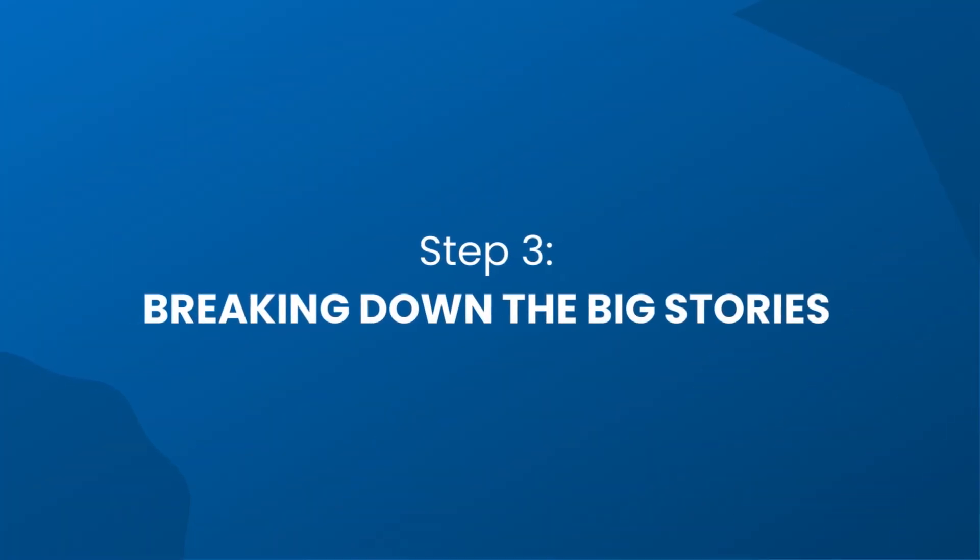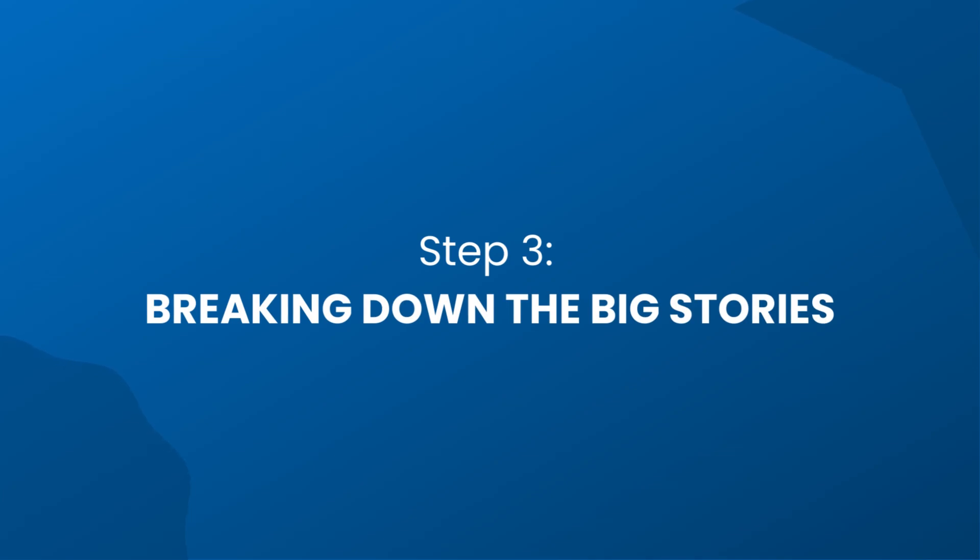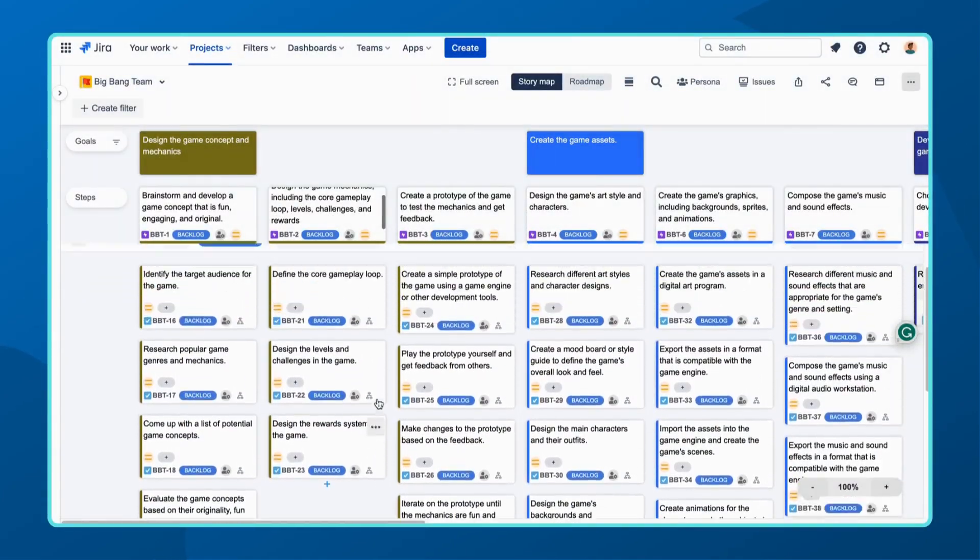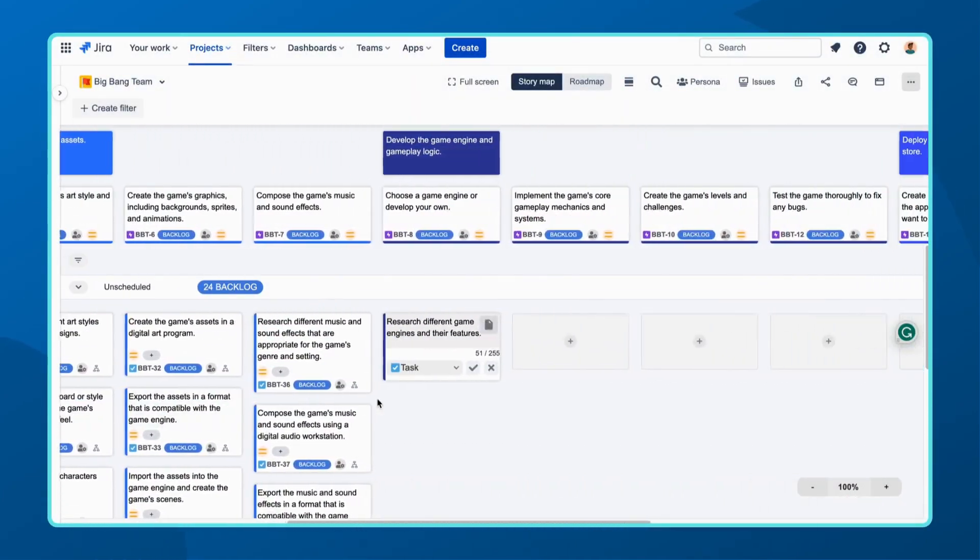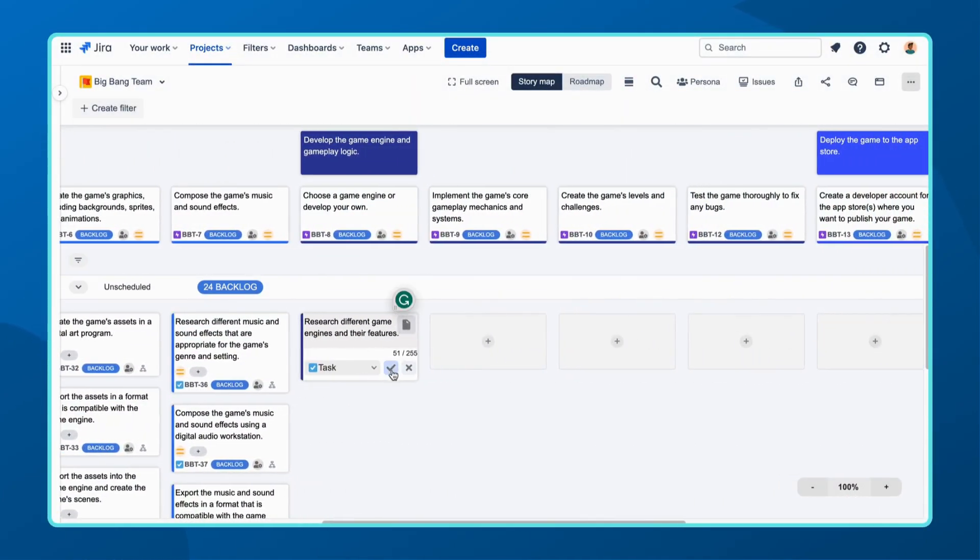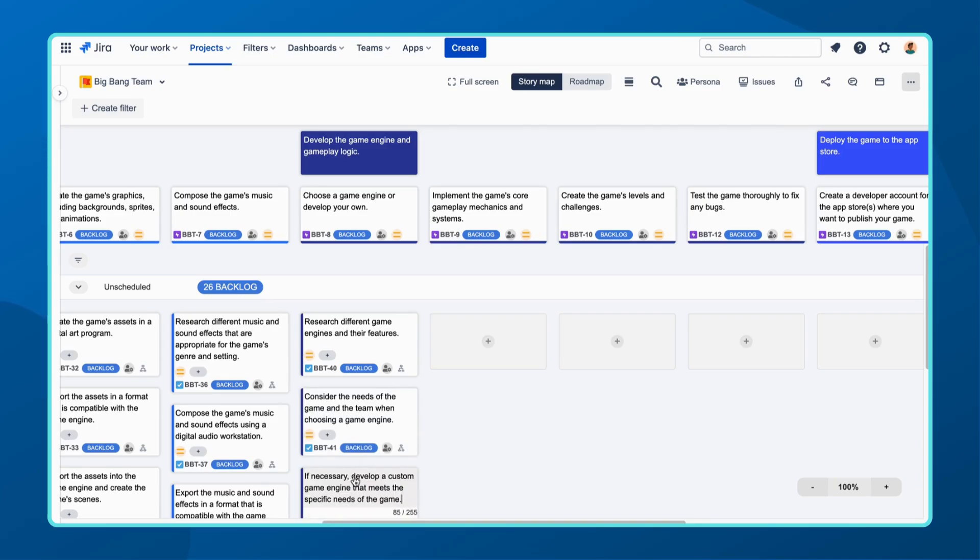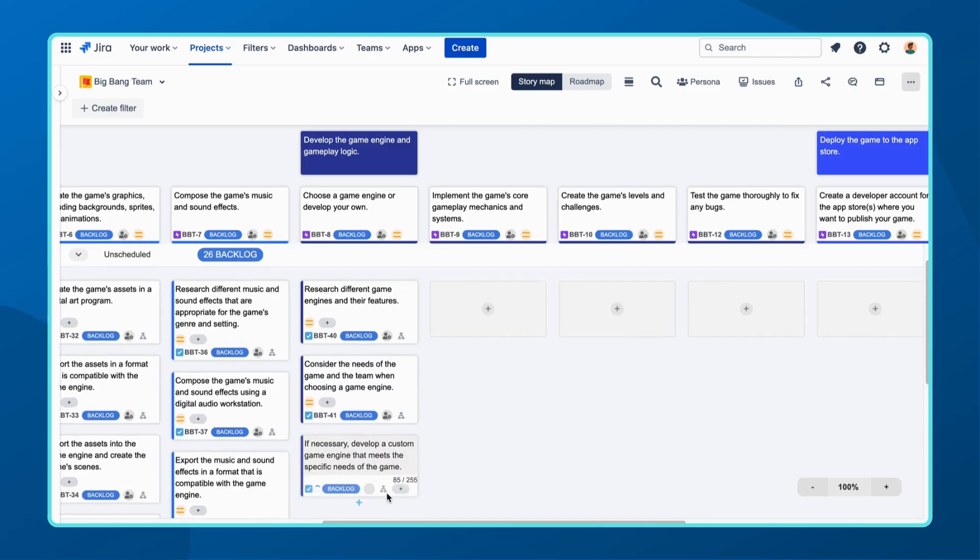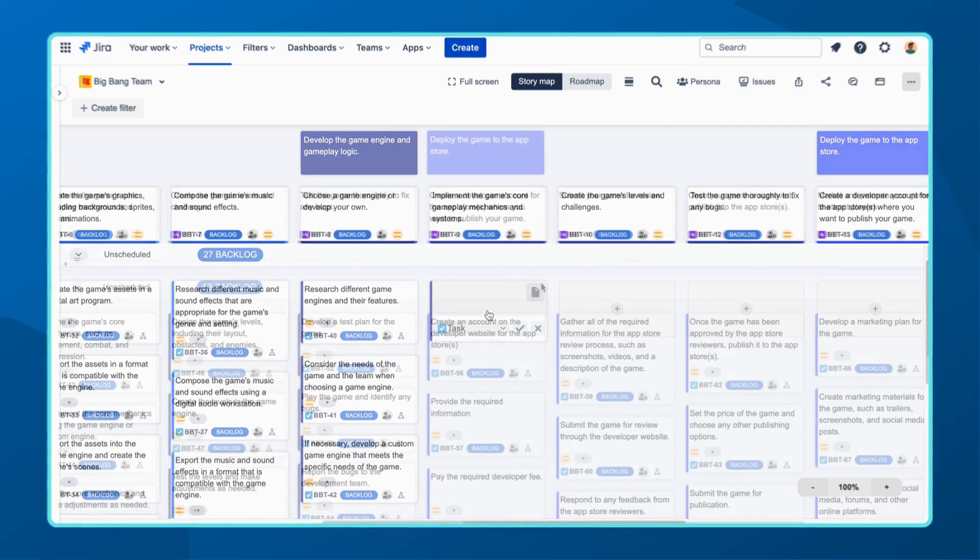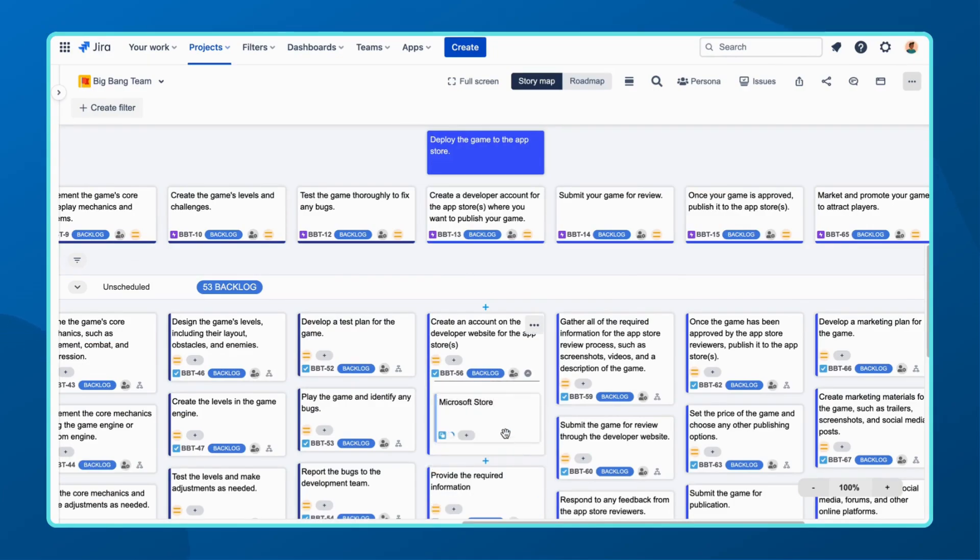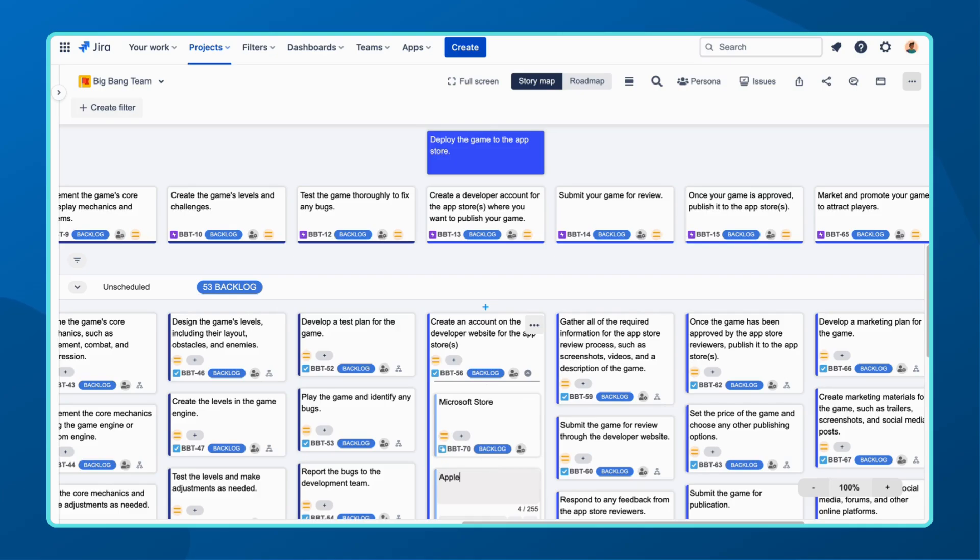Step three is all about breaking down those big stories or epics into smaller, more manageable units. An epic, as we mentioned earlier, is a significant section of your software product. To make it more manageable, break it down into user stories, which can be seen as the main tasks that need to be completed. Keep in mind that user stories can contain tasks, making it easier to track progress and assign responsibilities.